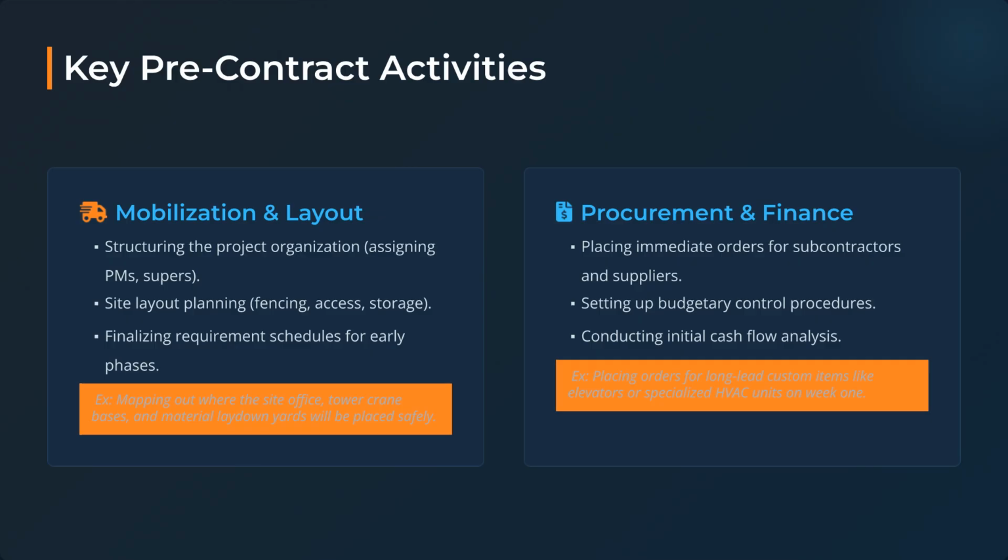Why do we put so much effort into this early planning stage? The reasons are very straightforward. We need to outline the master plan and strategy for the project. We must establish a logical construction sequence. You can't pour the roof before you pour the foundation. It allows us to identify key project dates and perform an accurate assessment of contract budgets. Finally, it helps us schedule key dates with respect to key materials. For instance, if you know custom steel beams take 6 weeks to manufacture, you must schedule that order well in advance of the day you need to install them.